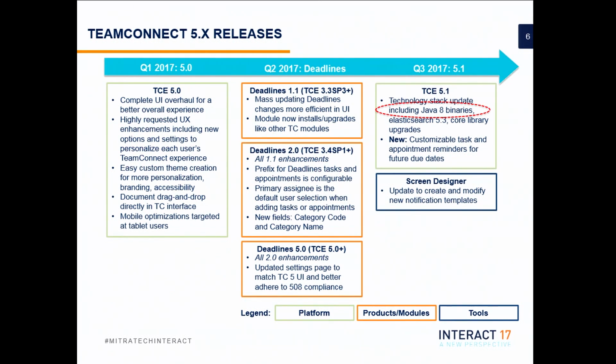So these are the three highlights. TeamConnect 5 has enhanced Java 8 libraries. That definitely requires an upgrade on your infrastructure side. So that needs to be accounted for when you are planning for the TeamConnect upgrade, because setting up the environment also takes some time. Even if you have a perfect project plan, if your environment is not ready, it's going to delay your project.